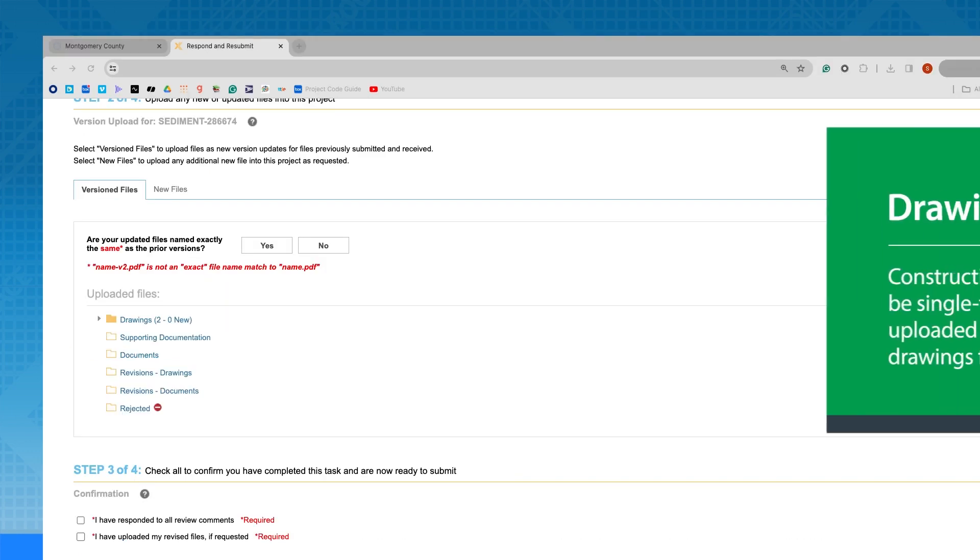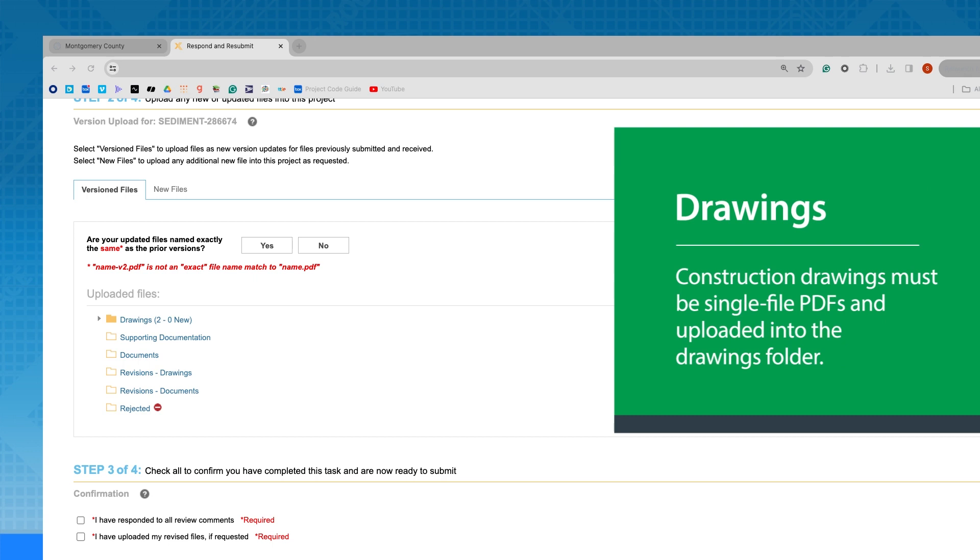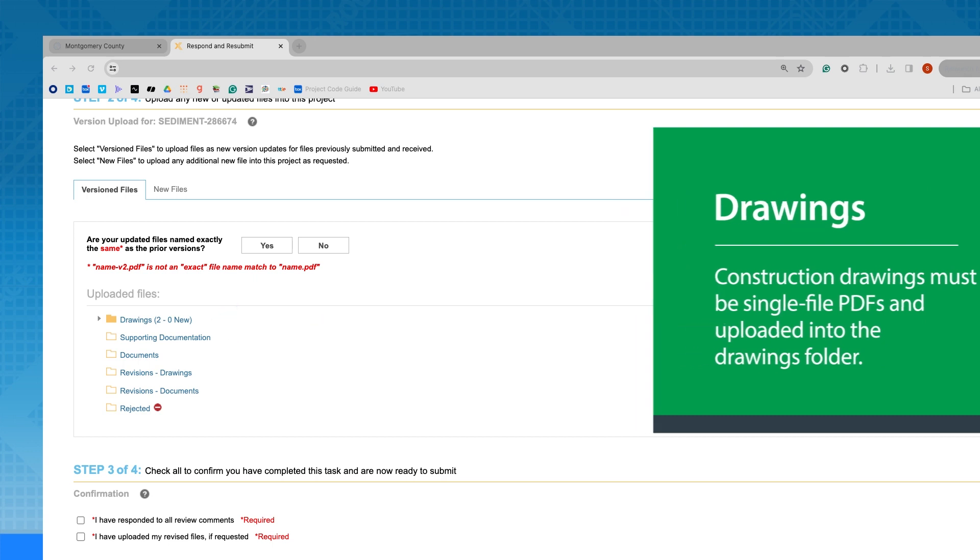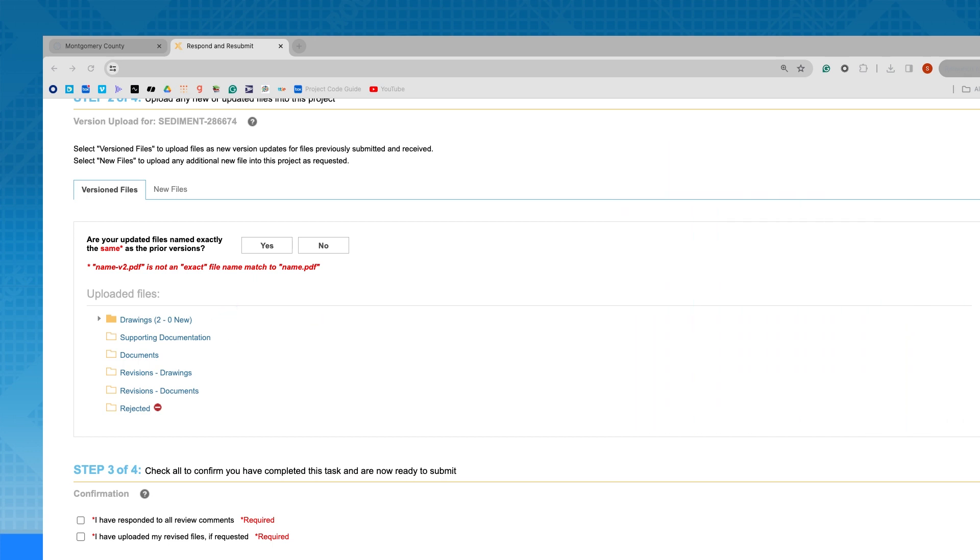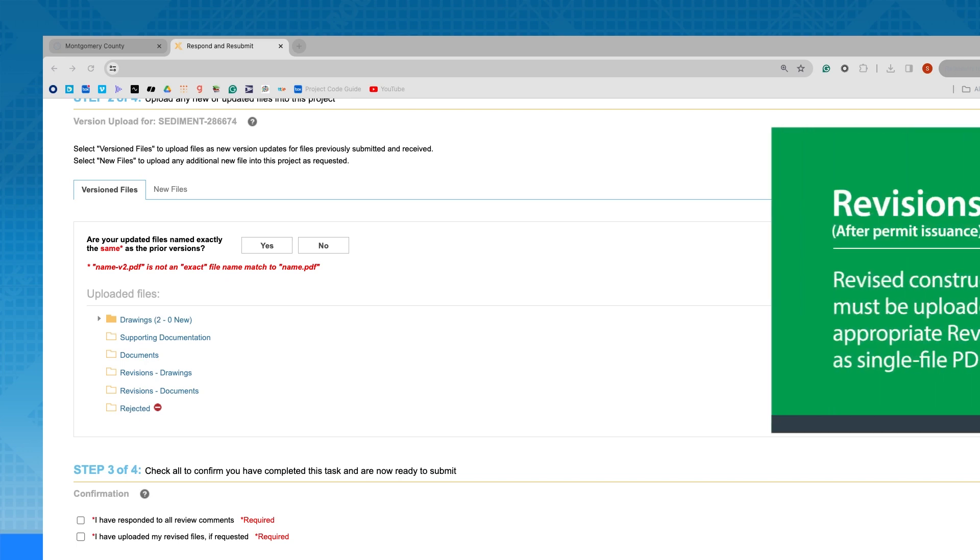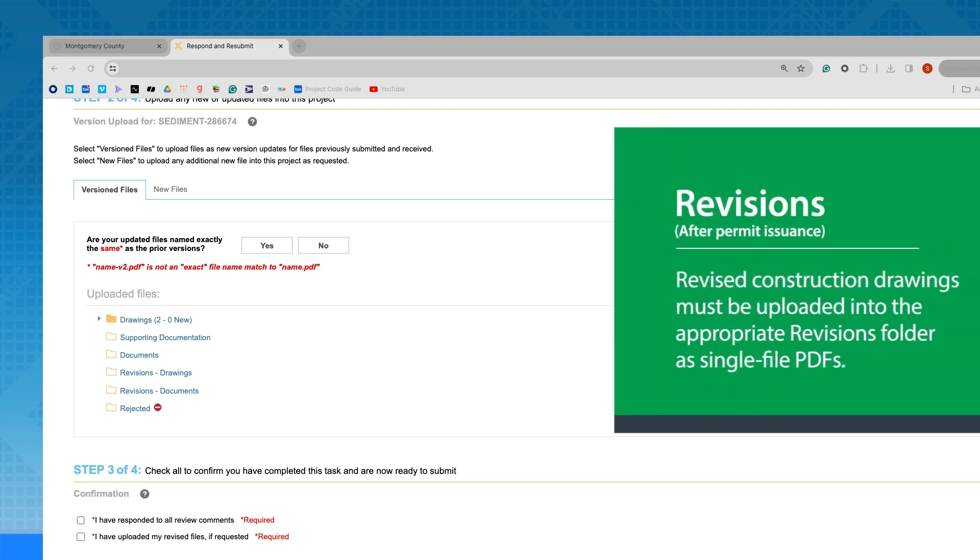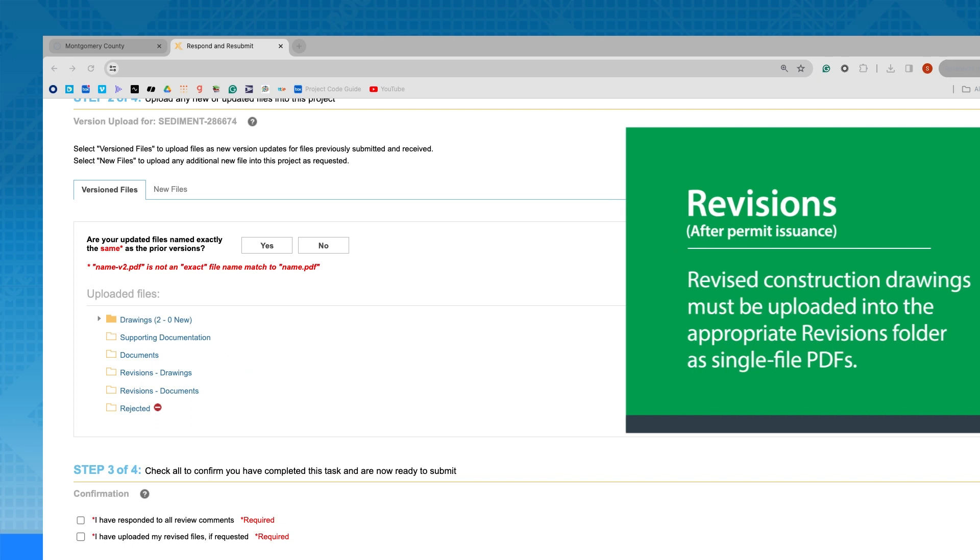Construction drawings must be single-file PDFs and uploaded into the Drawings folder. Where a permit revision is needed after issuance, revised construction drawings must be uploaded into the appropriate Revisions folder as single-file PDFs.